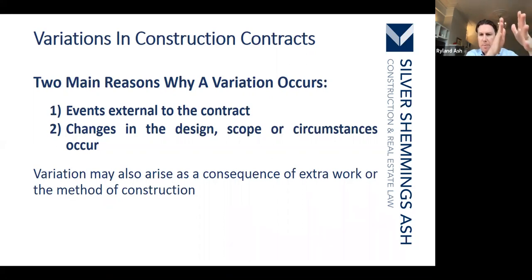This might be a good time to mention the coronavirus. So those of you familiar with the other provisions of the JCT contract will know that there is a force majeure provision in the relevant events for an extension of time claim, but there is no force majeure provision in relation to relevant matters and loss and expense.